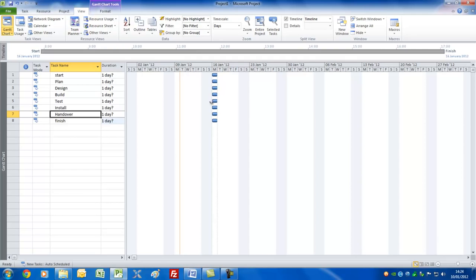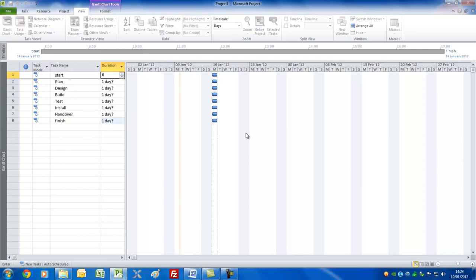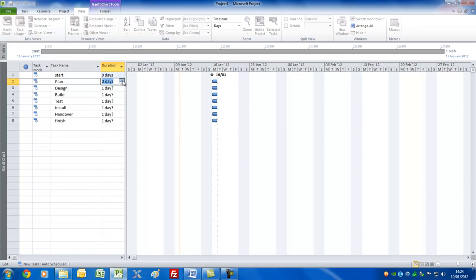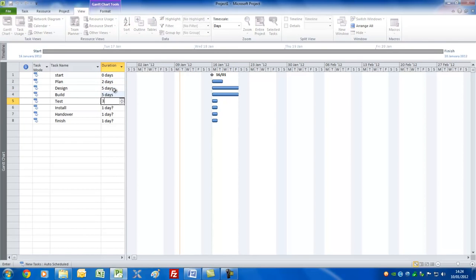They've all lined up exactly on the start date of the project, waiting for you to tell them something different. The question marks show that by default Project is assuming they are estimated tasks. I want the Start to be a milestone task, so let's put that to zero. We'll have Plan as two days — I'll use the spin control to show you how that works. Then Design five, Build five, Test three, Install three, and Handover one. And we'll set Finish to a milestone again.